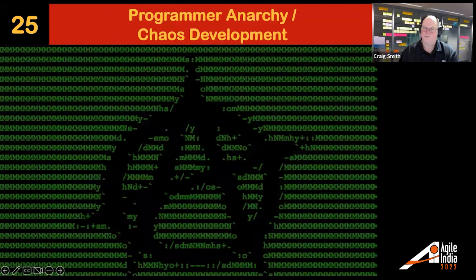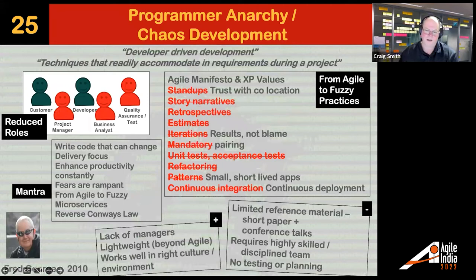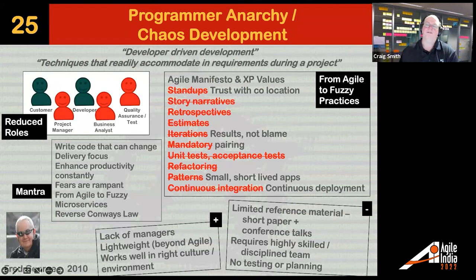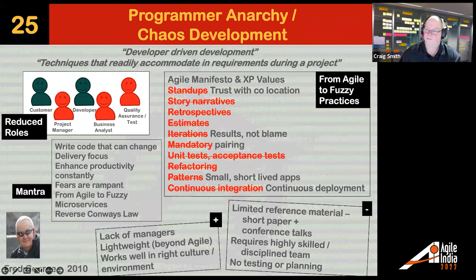Program Anarchy has been renamed to Chaos Development in more recent times. It was the work of Fred George, based on work he did at a company in the UK called Forward, and has been adopted at organizations like GitHub. What they essentially did was move from Agile to very fuzzy practices: no standups, no retrospectives, no managers — just work fast. It's developer-driven development. In some organizations with a very good culture where everyone is committed, this could work really well. Beware — there's no testing or planning, because you're going at speed.